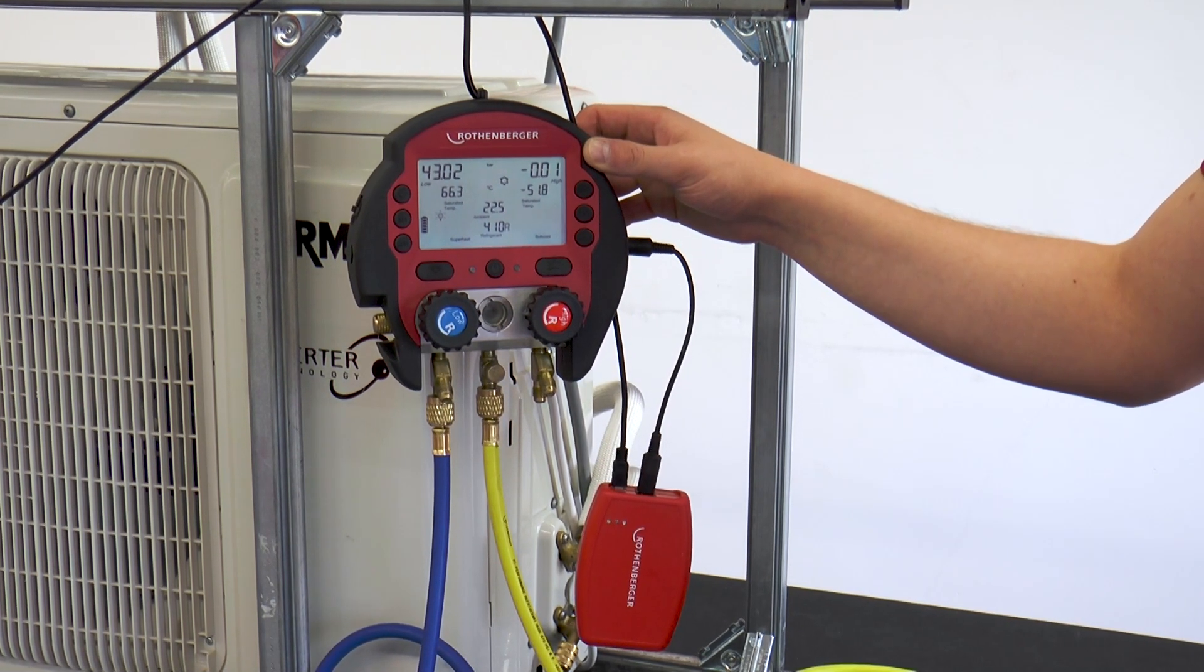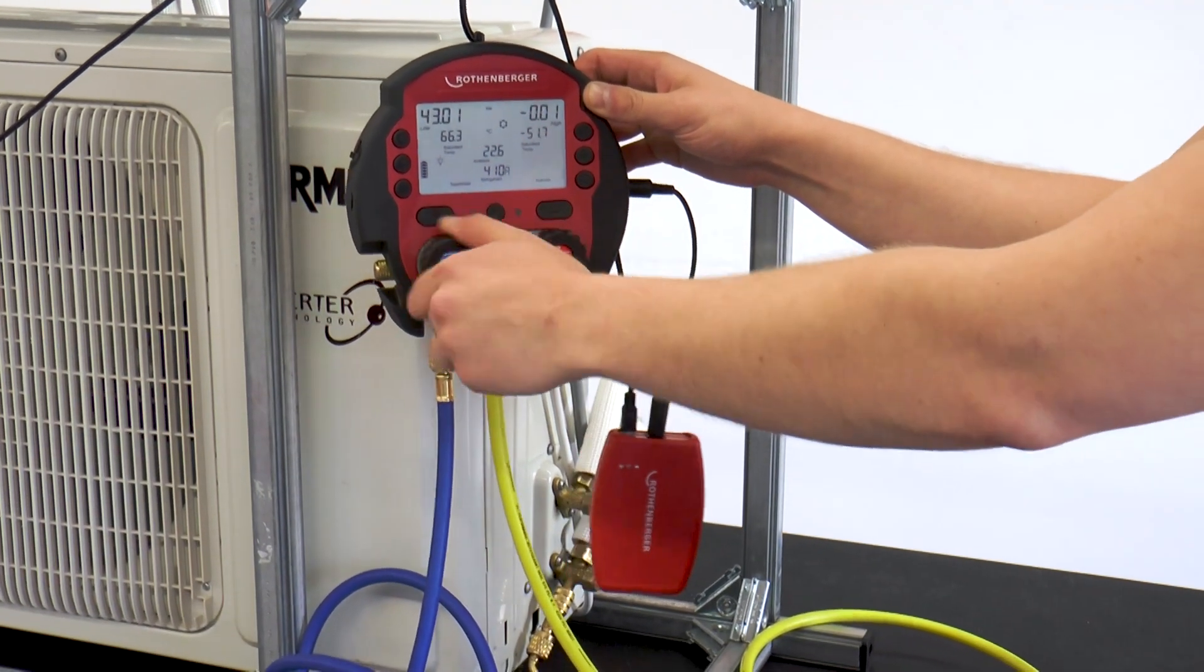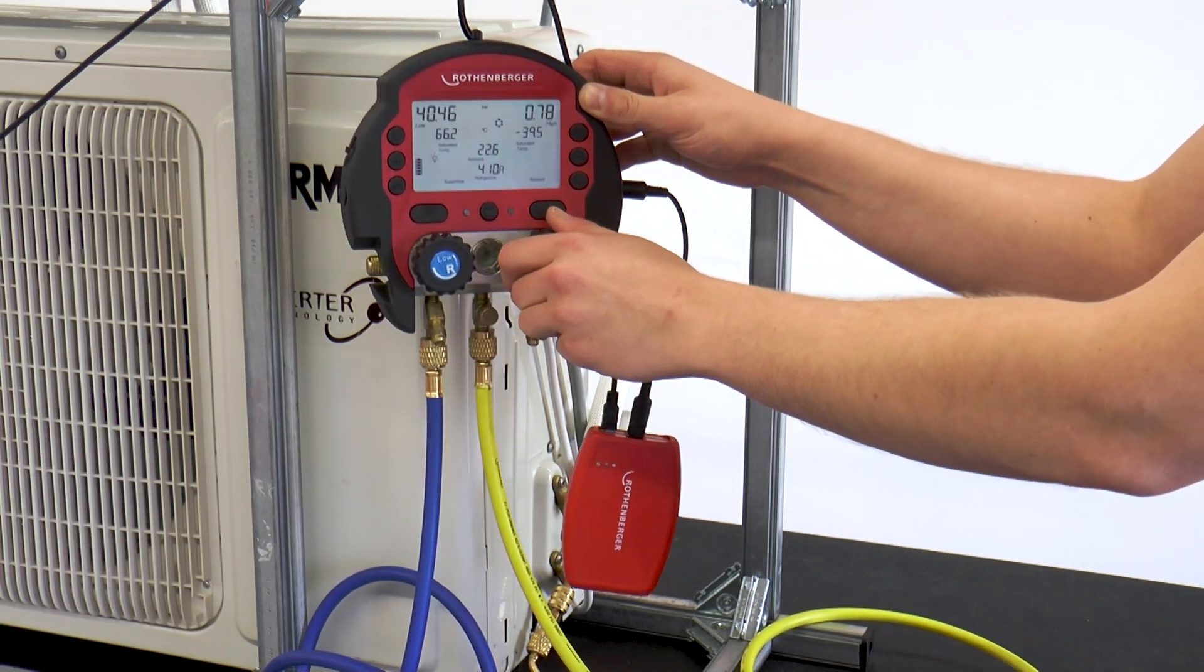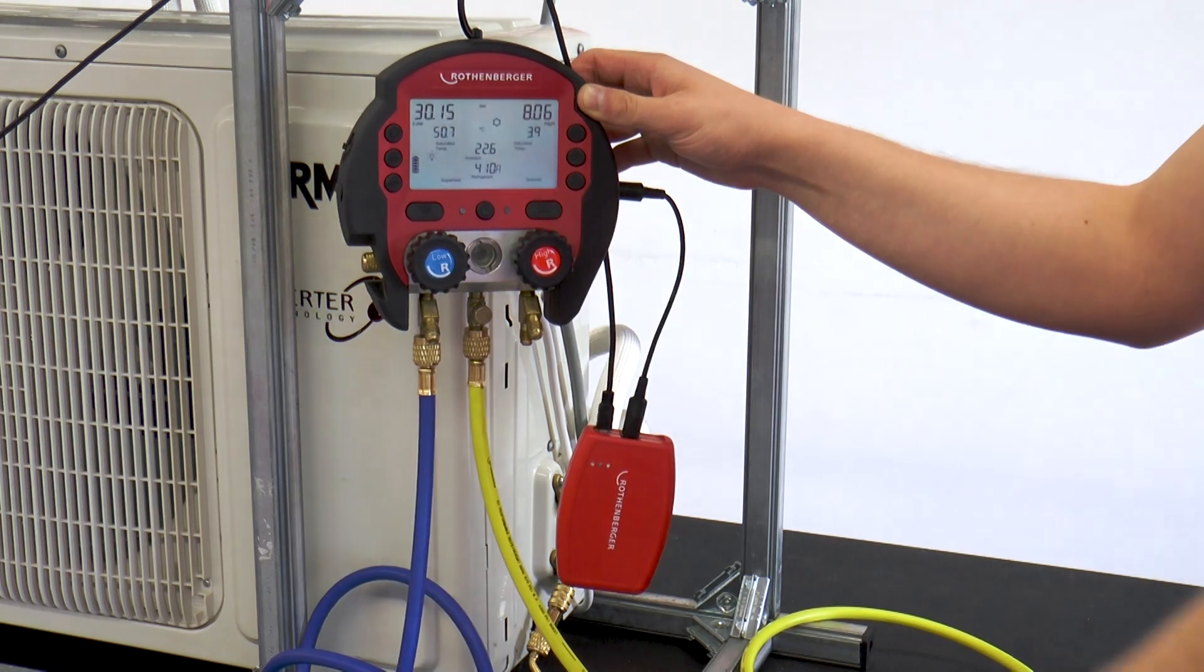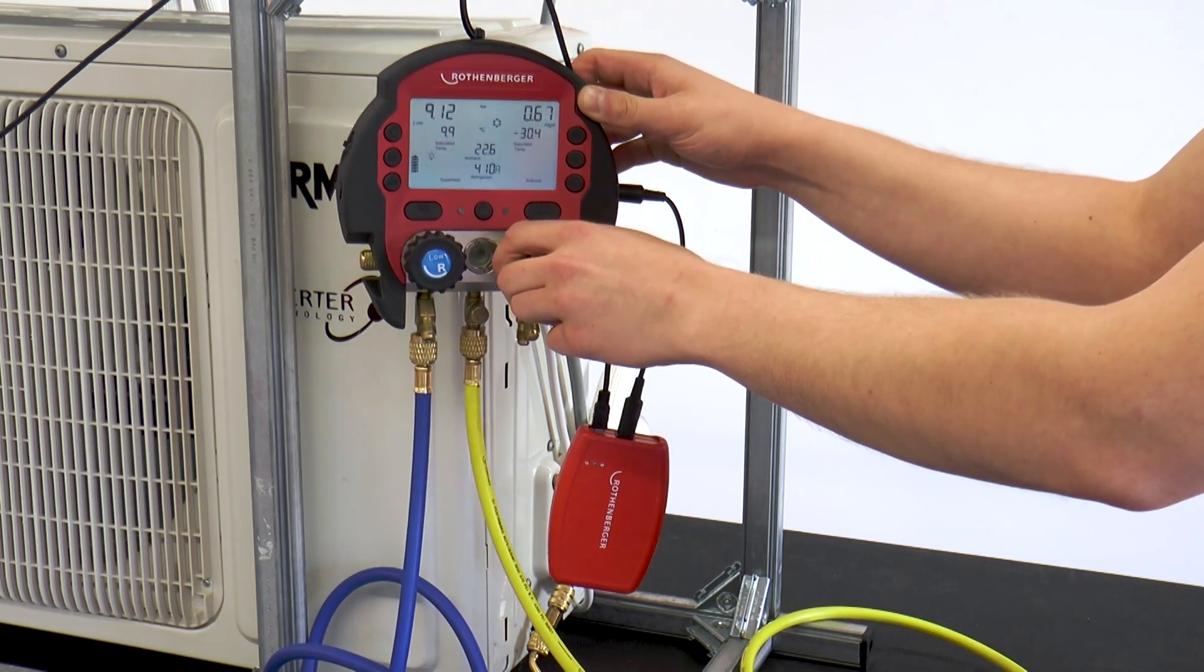For this purpose, the working valve on the low pressure side is opened. Then, the valve on the high pressure side is opened and the nitrogen flows out. This was the load test. The load test is carried out for approximately 30 minutes, unless otherwise specified by the manufacturer.